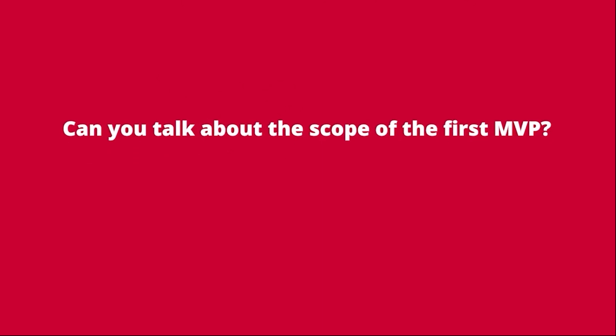Dan, I'm hoping you can start out by talking about the scope of that first MVP or minimal viable product. Yeah, sure. We wanted to get something that we could deliver by the end of the year, but we wanted to make sure that we had as much usable functionality in it that we could. So I went on site. We had a wide group of stakeholders involved in the meeting to get all different views. We had people from sales, we had the customer success managers, project managers, and senior techies at Forward. And we looked at the day in the life of a typical user.